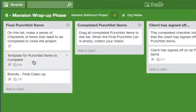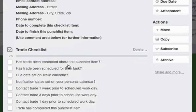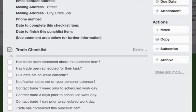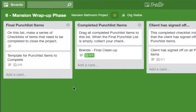So here's the template for the punch list items to complete and you can make these any way you want, but if you have a work order I would just attach it here so you don't have to fill all this out, and then check these off, make sure they're done in a timely manner. So if Brenda was done we would drag her over to the completed punch list items and then we just check off that final checklist and she would be done.